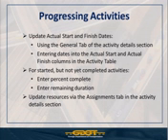As far as the remaining duration, you're going to have somebody else from a different office maybe changing that, that's their tab. So this is going to show you the baseline. Let's say the task was originally 30 days and they're 50% complete, and you think it means 15 more days, but if they enter their remaining duration as still needing another 30, it's going to show you that, but still show you the baseline. Yeah, so the baseline is locked in place, right? The baseline is always going to be whatever the baseline was established to be.